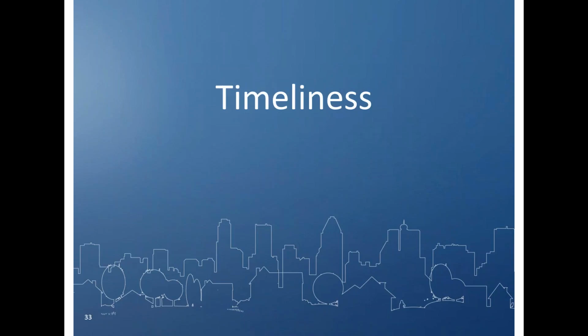That way, let's say that project falls apart, and therefore you have to move that time back over to admin, you have the timesheet down to that particular address so that you know what time you actually have to move. So that would be the most complicated, and there are lots of software packages that would allow you to do that.